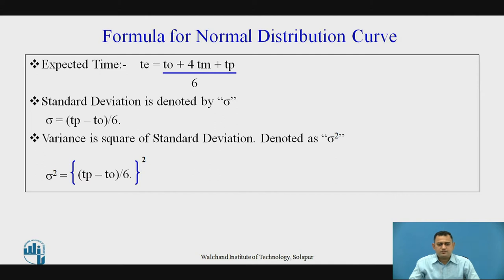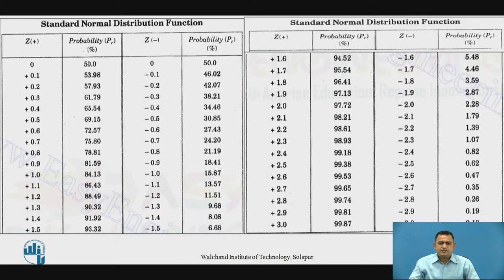These are the formulas for the normal distribution curve. The expected time Te is necessary to determine the expected time for each activity, which helps finalize the overall project duration and the critical path. We also have the standard deviation and variance of the normal distribution curve. This table shows the standard normal distribution with normal deviate Z and probability completion percentage. We utilize these formulas and this table for finalizing the scheduled completion time and probability completion time of the project.